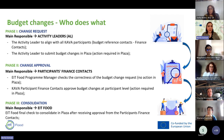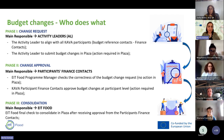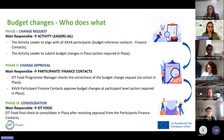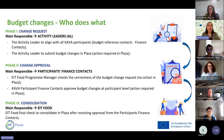Regarding budget changes, there are three phases. The first is the change request phase: the Activity Leader is the only responsible person to work on Plaza, aligning with all KAVA participants regarding budget changes — especially finance contacts in many organizations. The Activity Leader needs to submit budget changes in Plaza, which requires an action in Plaza itself.